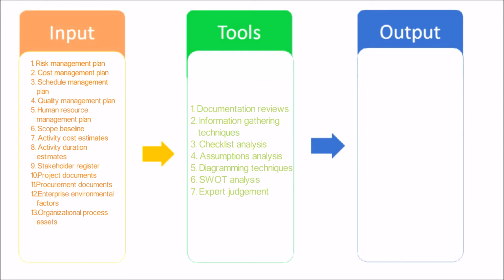Assumptions Analysis. Every project and its plan is conceived and developed based on a set of hypotheses, scenarios, or assumptions. Diagramming Techniques. SWOT Analysis. This technique examines the project from each of the strengths, weaknesses, opportunities, and threats perspectives to increase the breadth of identified risks by including internally generated risks. Expert Judgment. Risks may be identified directly by experts with relevant experience with similar projects or business areas.